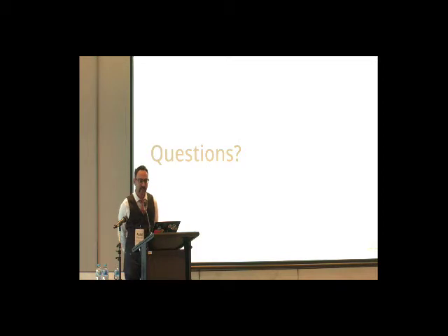Yeah, pure agile is quite tricky, especially when you're working with projects. Obviously, with the traditional approach, you need to have everything kind of up front. So we would normally estimate what the effort would be, but we'd speak to the vendor probably a little bit earlier than when everything was due. So we try and work out what the expectation was between the vendor and ourselves, and what the expectation was about the budget in particular. It really works out what effort the vendor thinks they can get done for the particular budget.